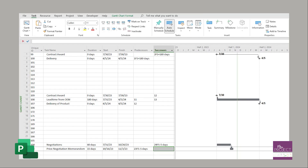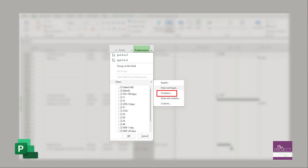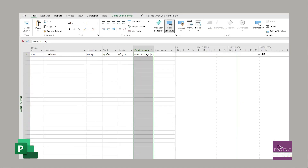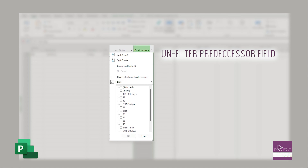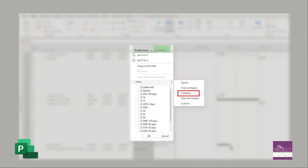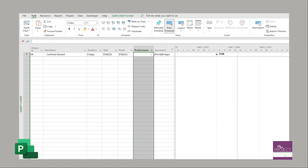To find your lags in Microsoft Project, filter on your predecessor and successor fields and use 'contains' with a plus sign. This will pull up tasks with lags. Make sure to apply this filter to both the predecessor and successor columns to catch all instances.